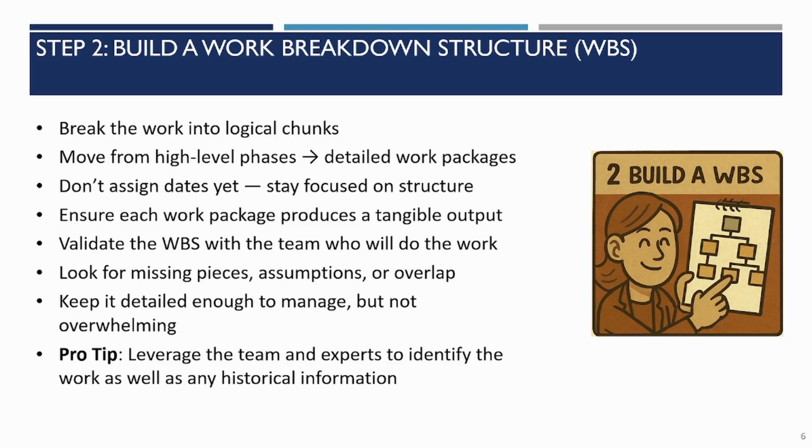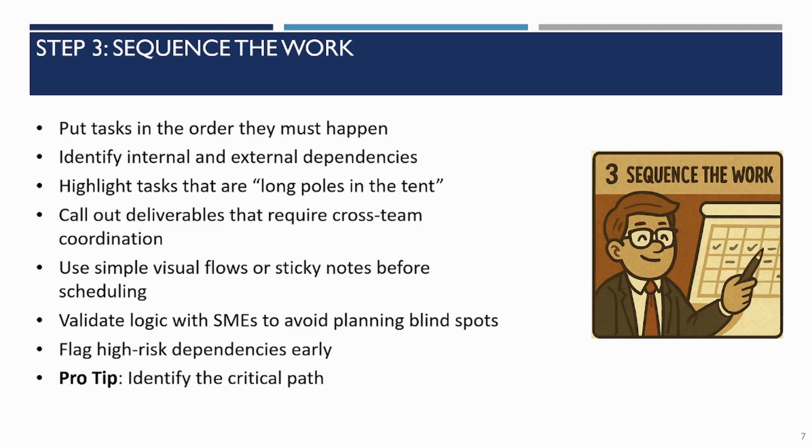So we've identified our objectives, we've built the work breakdown structure, and now we need to sequence the work, which is essentially putting the tasks in the order that they happen. And a lot of times there's dependencies between the work, so one activity can't start until the other one does. So you can't slice the sandwich until you've put it together, as an example.